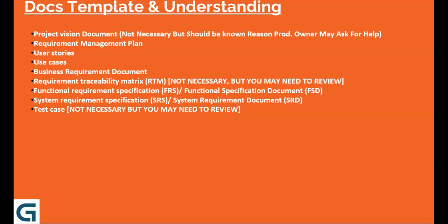this document is important. Many a times the customer asks for some other functionality which was not even discussed earlier. So basically it is out of scope. So what do you do in such a scenario, right? I think we had discussed, or I'm not sure in this session or another, we said that okay, we come back and tell the customer that we'll internally review and discuss among the team, and if it is not hurting our timelines, budget, or we have the skill and it will be a short task, then we do that.